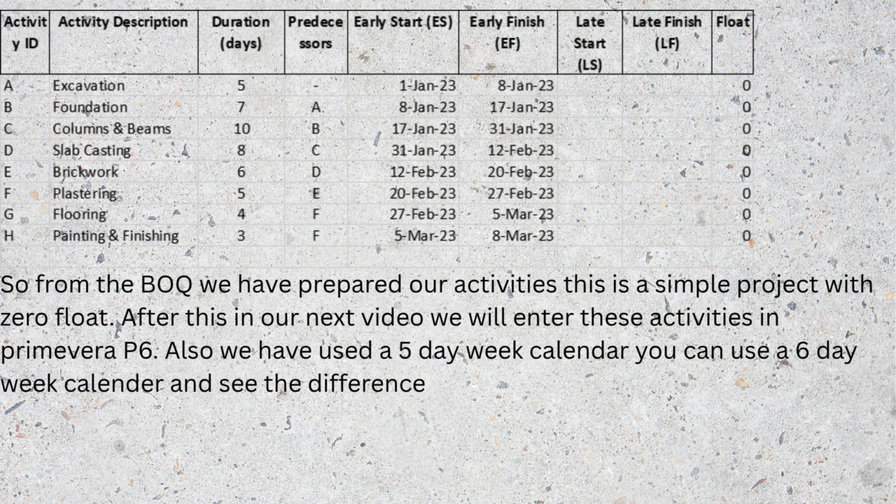Now, also I have put here a sample calendar. We have just taken a 5-day week calendar. Actually, in practical life, there will be a 6-day week calendar. But just to give you the idea, we have taken a 5-day week calendar. So, based on the calendar, the scheduling will go because nobody will work 24/7. Everything because there will be holidays, and in our country there will be religious holidays also. That is a different issue. We have just only taken the weekday holidays here in our calendar. In the actual calendar, we will have to put in all the various holidays which will come.